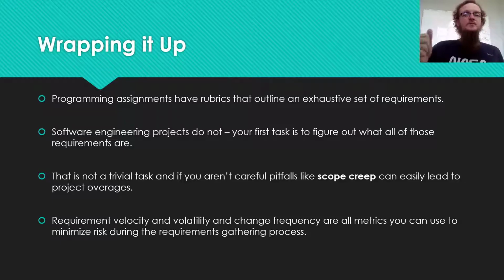The ideal situation would be that you've elicited a whole bunch of requirements from the client, you have a sufficient number of requirements to go to implementation, and not only are those requirements not changing very frequently, they're also not getting added to week over week. Then you can rest assured that if you go into the analysis or the design or the implementation phase, you're at the minimum risk that you can reasonably expect to have.